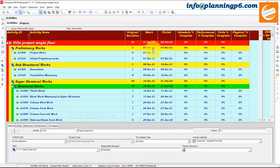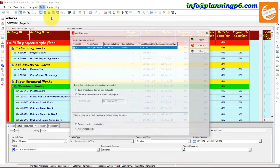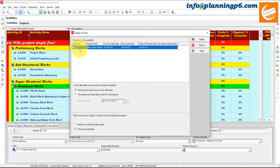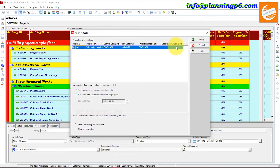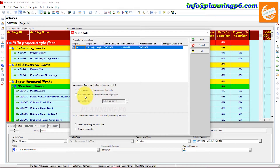Go to Tools and Apply Actuals. Here you can see: Project ID, Project Name, Current Data Date, New Data Date, Planned Finish, Planned Start Date, and Last Apply Actual Date. There are two options: 'New Data Date' is used when actuals are applied and each project uses its own new data date, or the same new data date is used for all projects.